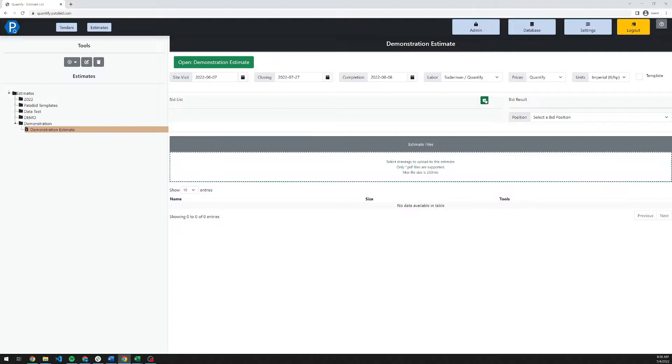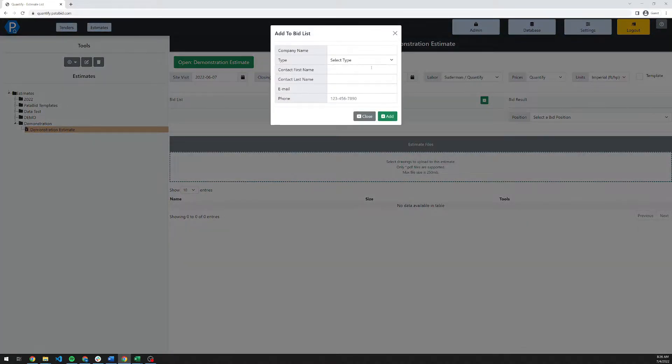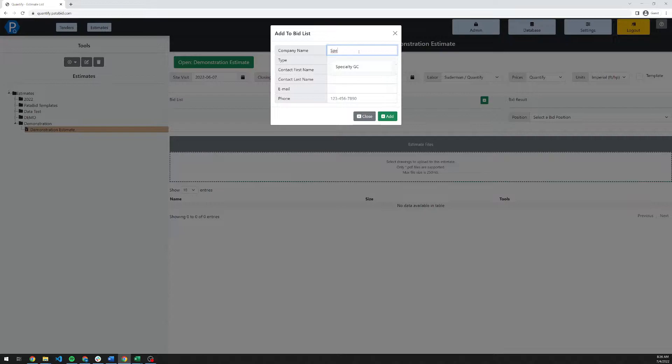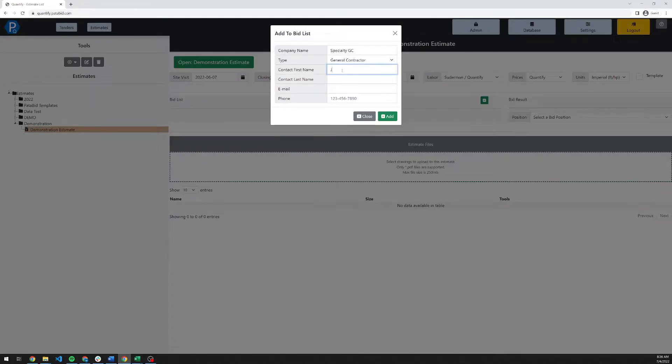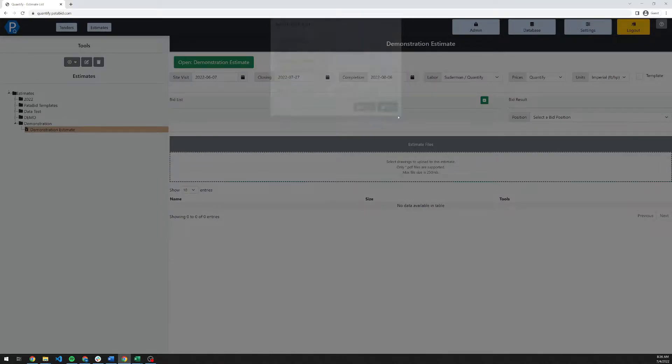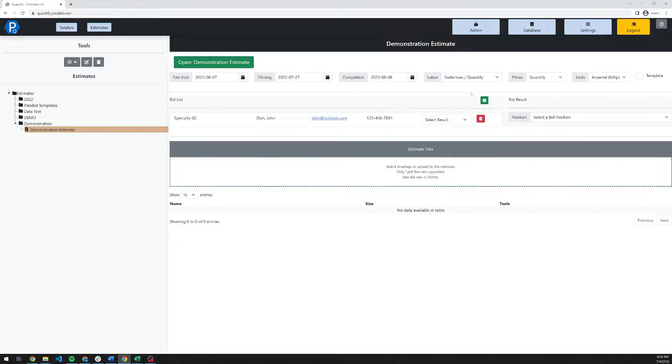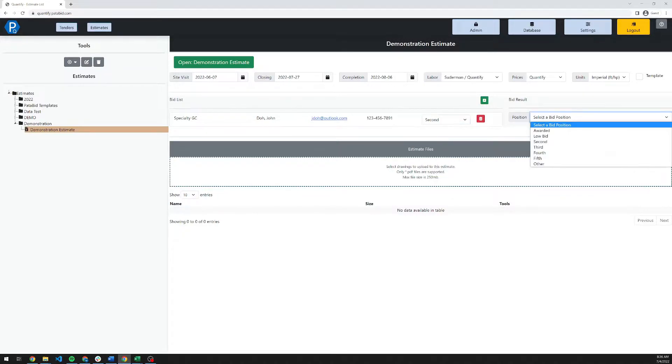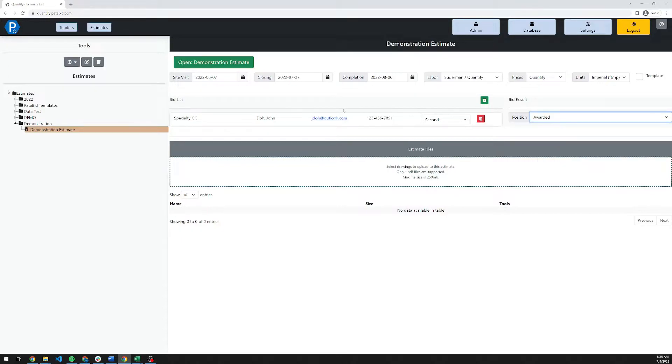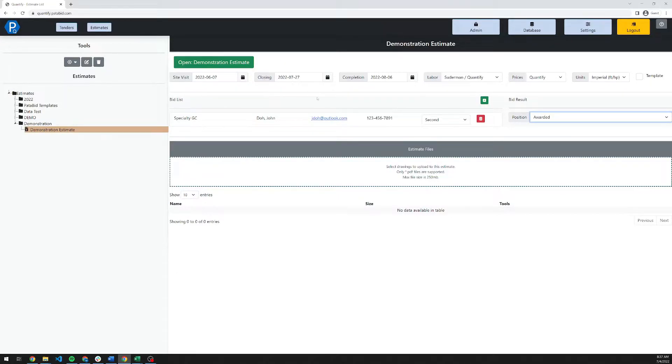We also have the ability in here to track your bid lists. If you want to use this feature, you can enter in companies, details for the person and contacts. You can add as many companies as you would like to this list. Once the estimate is closed and you receive feedback, you can select the positioning for the bid. This allows the metrics to be pulled out later for estimate performance within your company.